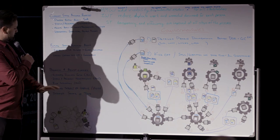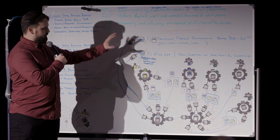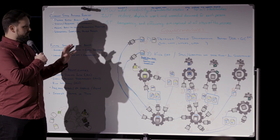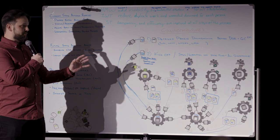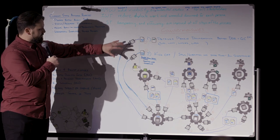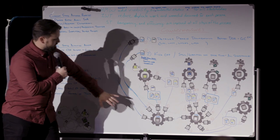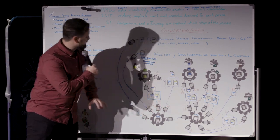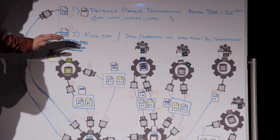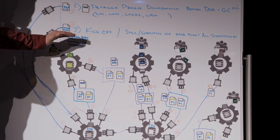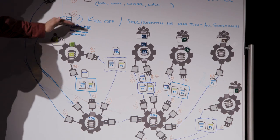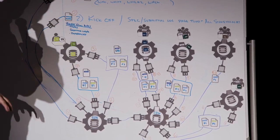Before, everyone had their own system of record, their own status, their own source of truth — no agreed-upon status, so everyone had a different lens. In the proposed solution, you set up submittals into a common data environment — a CDX. The second meeting sets up process flows and rules: defined statuses, importance and weight of submittals based on cost and schedule impacts, and dependencies between items.